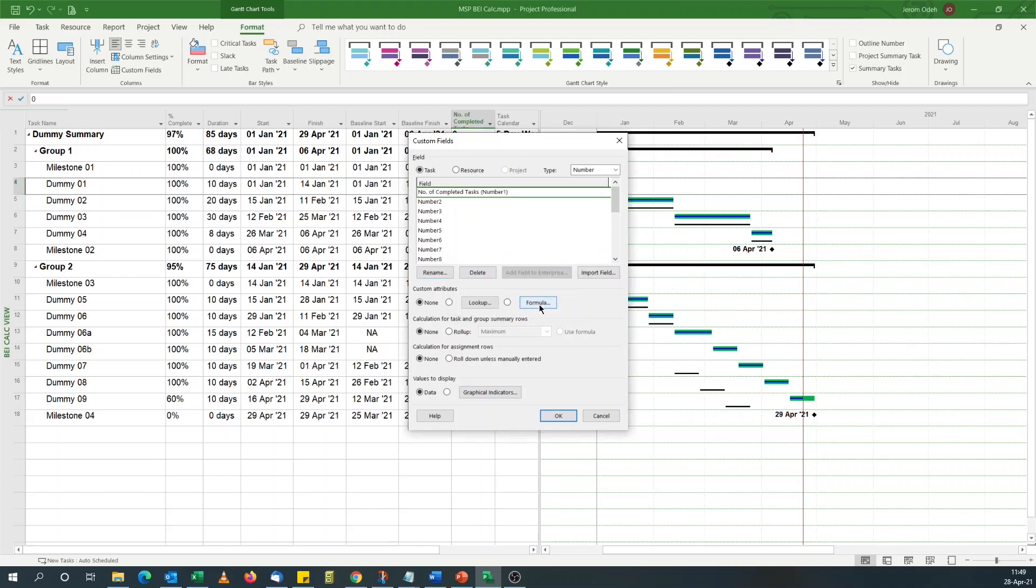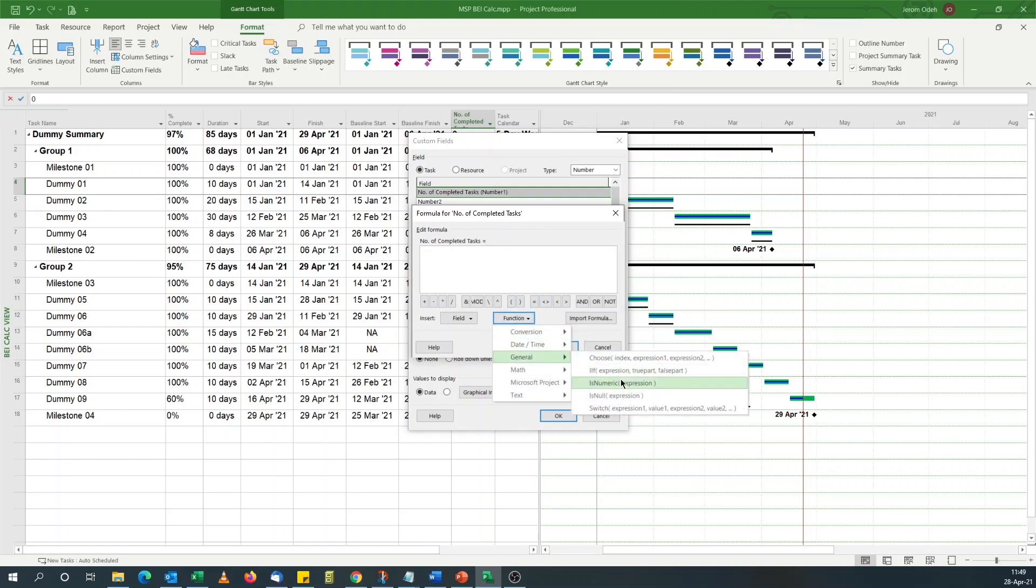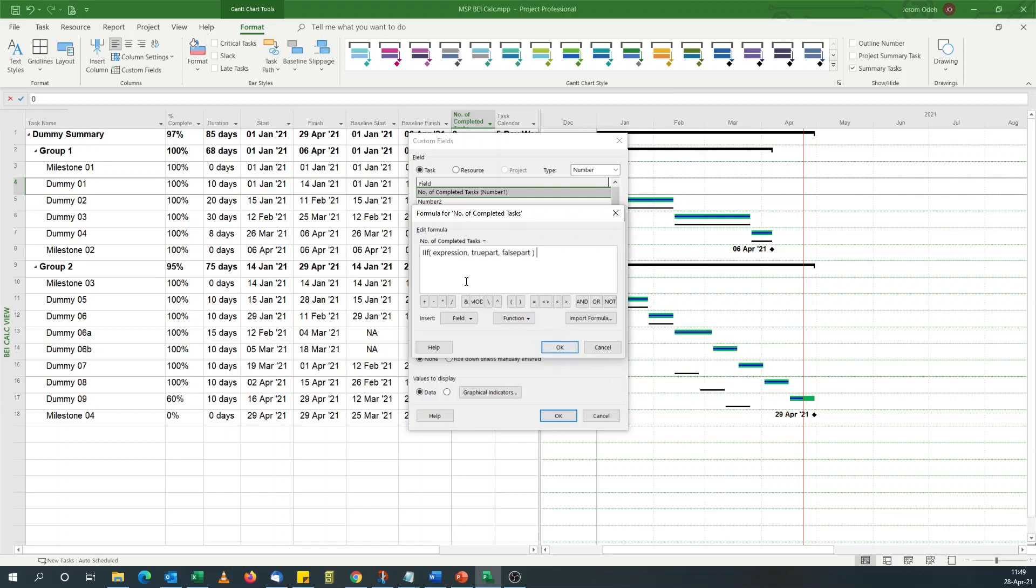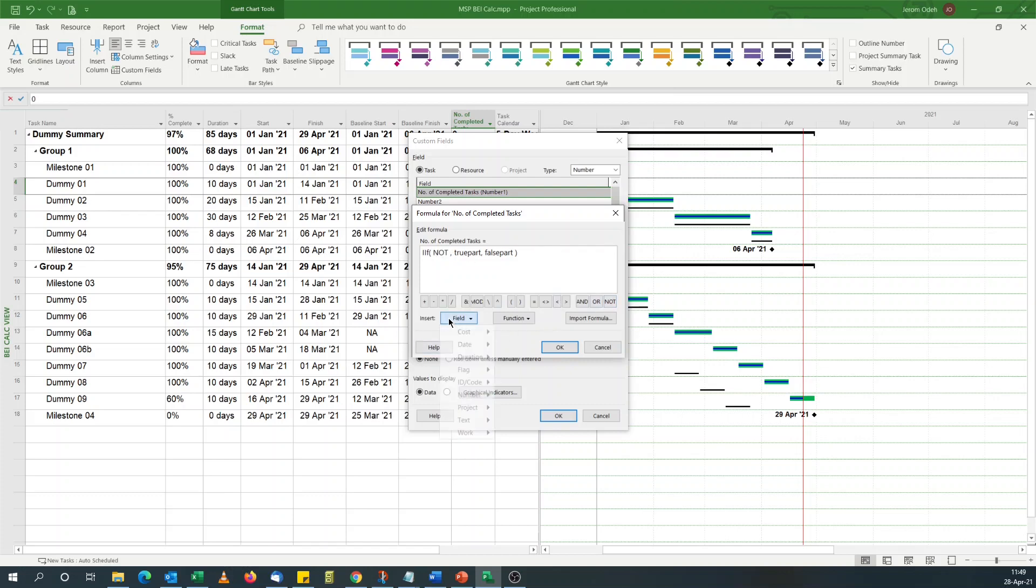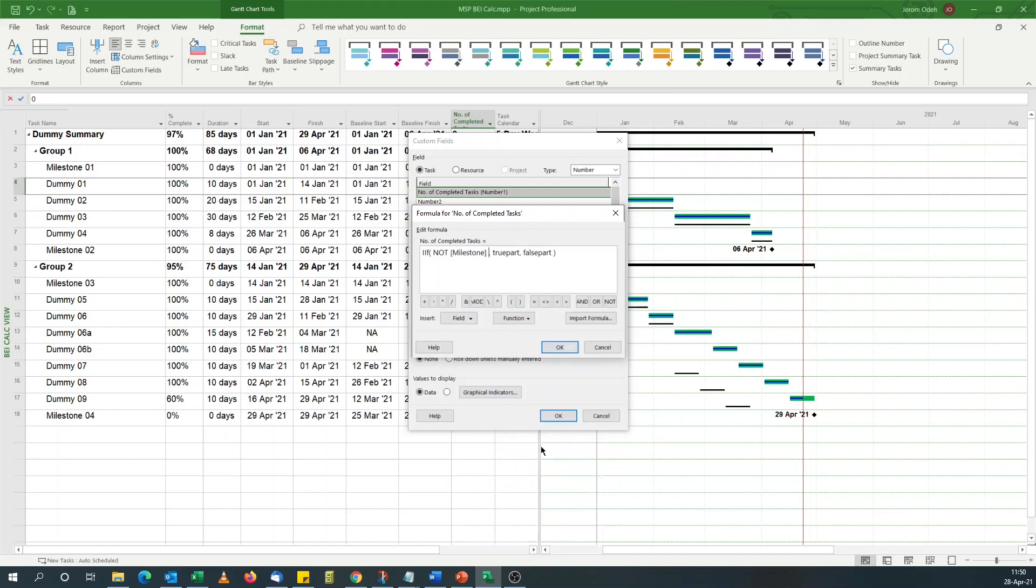Now I'm going to use a formula. I'll go for an IF statement. First of all, I need to exclude milestones from the calculation because the BEI doesn't take milestones into consideration. So if it's not a milestone...